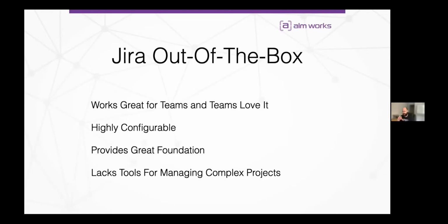As long as you can templatize to a degree and standardize enough so that one team can look at the information of the other team, whether it's their backlog or the current in-flight progress, and understands what's happening, where the blocking elements are, what's in progress, what are the prioritization elements. The rest of the details in terms of how they want to track things, whether they Kanban or XP or Scrum, that doesn't matter. But that little bit of information in terms of being universally signaled, this is the current state of the project, this is what's coming, and these are our immediate concerns around blocking elements, is basically key to the success.